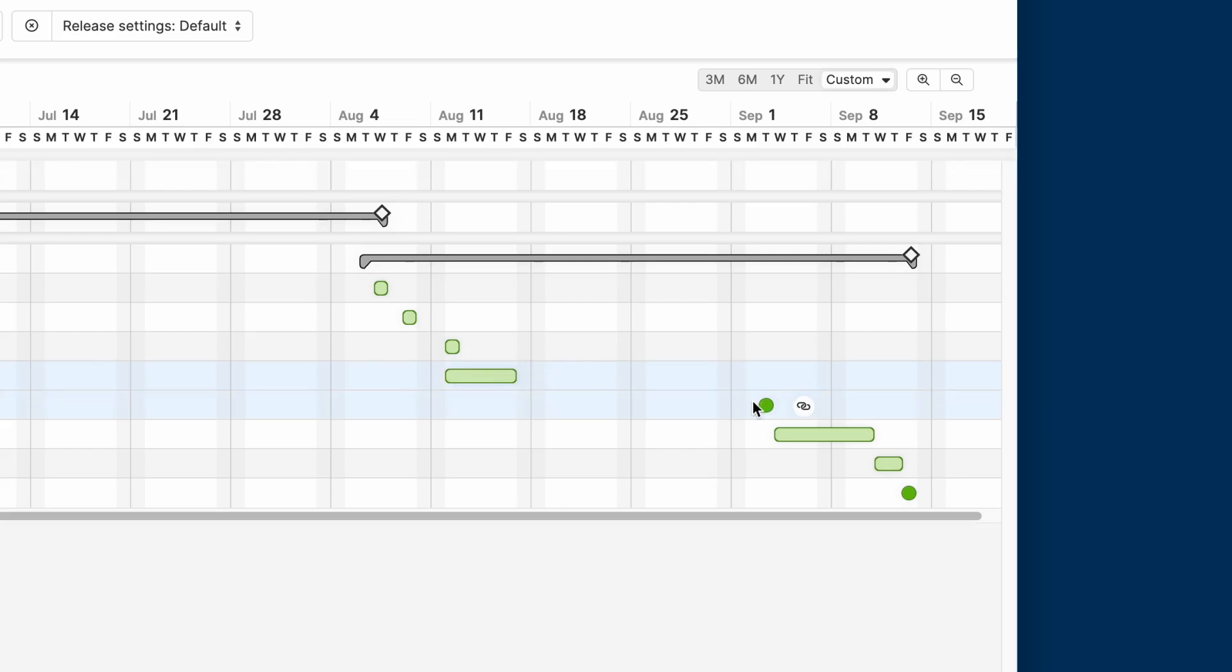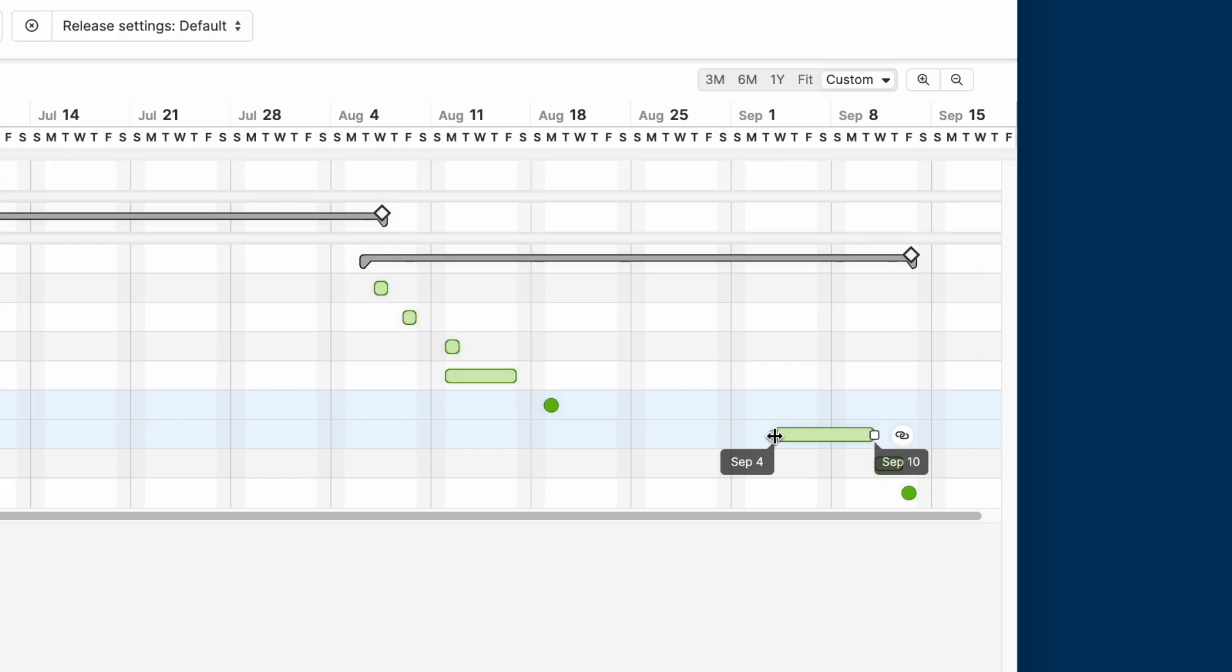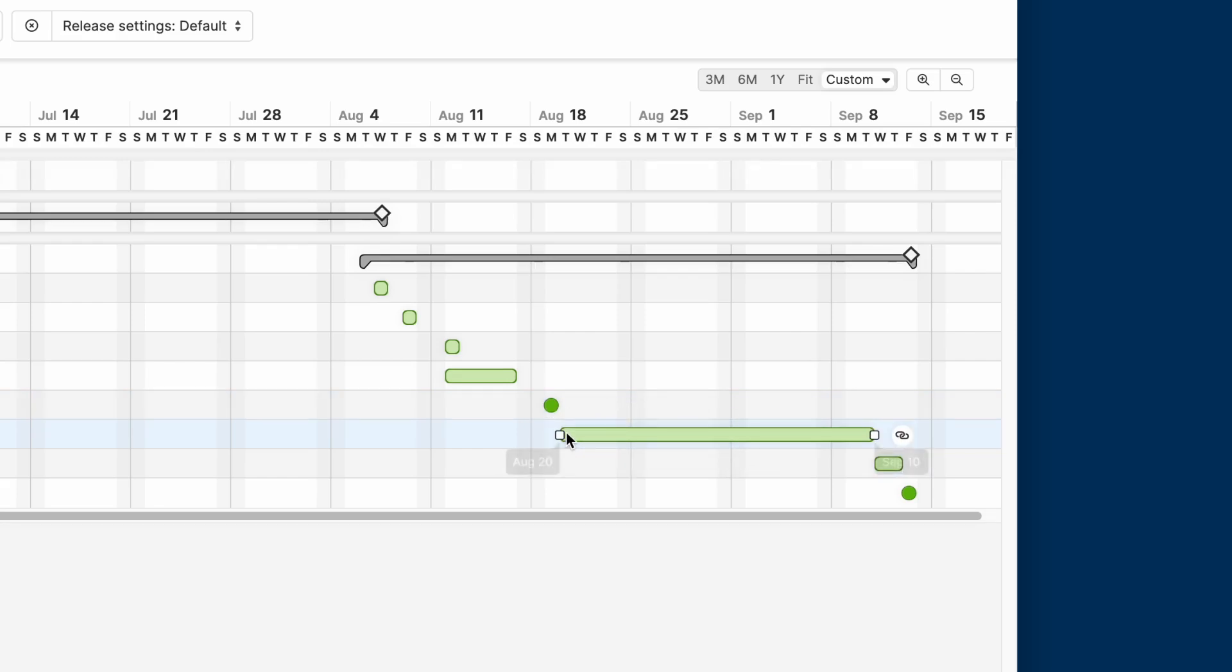If you need more time, you can also adjust that range here. For example, development is going to take a bit longer. So we'll simply drag it across to extend that phase. These phases and milestones help us coordinate all of the cross-functional work that needs to happen to launch on time.